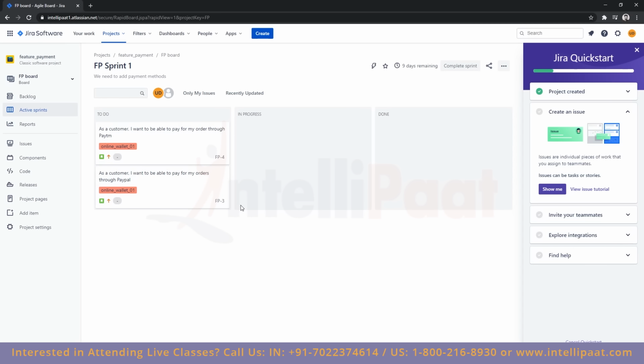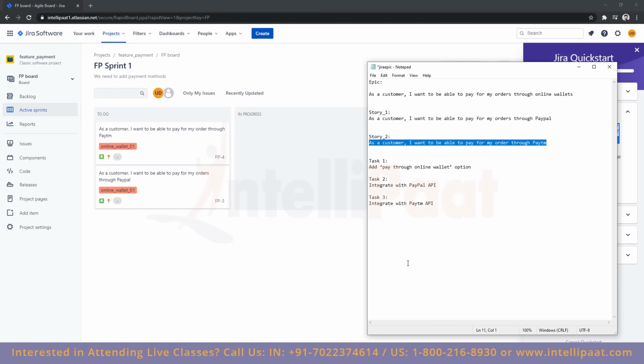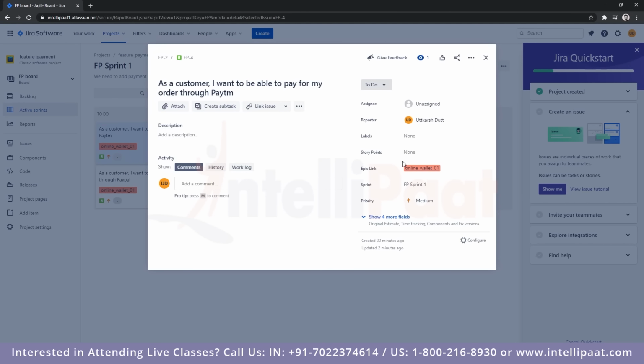Now we need to add the subtasks that are associated to these sprints. So these are the subtasks, right? So firstly, I will add this section over here. Click on this sprint, and here we can add some story points to this sprint, right? So for every particular feature that you have, you can add certain amount of story points, and that essentially tells you what sort of weightage it has in the software development lifecycle, whether it is a quantitative task or not, whether it will take a long time or not, right? So depending on how heavy this feature is, we'll add a story point. So here I'll just add a story point of 3.